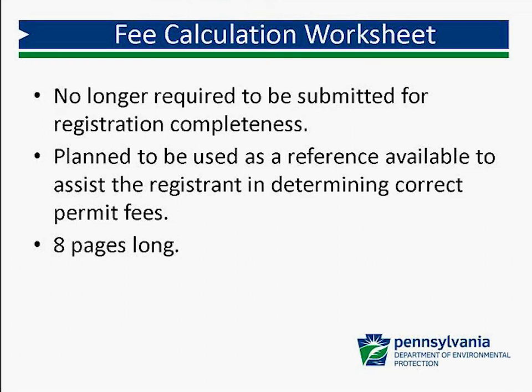At this time, since I do not have adequate information, I would recommend that regardless of your result, if you propose to impact wetlands in those 15 counties, you contact a bog turtle consultant to provide further direction on your project.